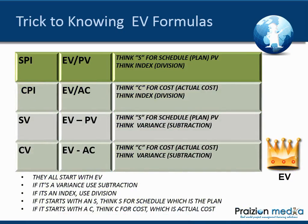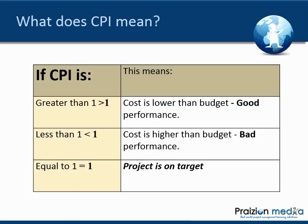So the pattern is: all formulas start with EV. Variances subtract, indices divide. S for schedule uses planned value; C for cost uses actual cost. Once you get that rhythm down, it becomes easy to remember these formulas.